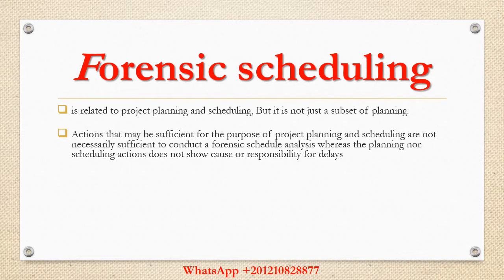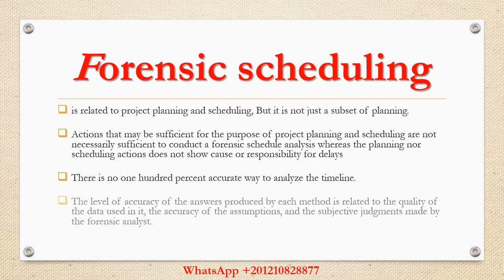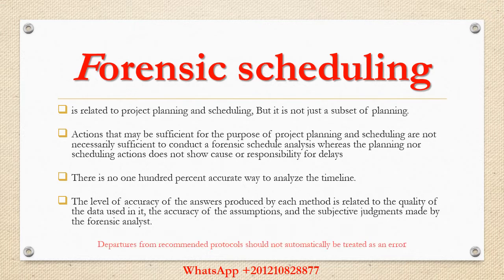There is no 100% accurate way to analyze the timeline. The level of accuracy of the answers produced by each method is related to the quality of the data used, and the subjective judgments made by the forensic analyst. Departures from recommended protocols should not automatically be treated as an error.